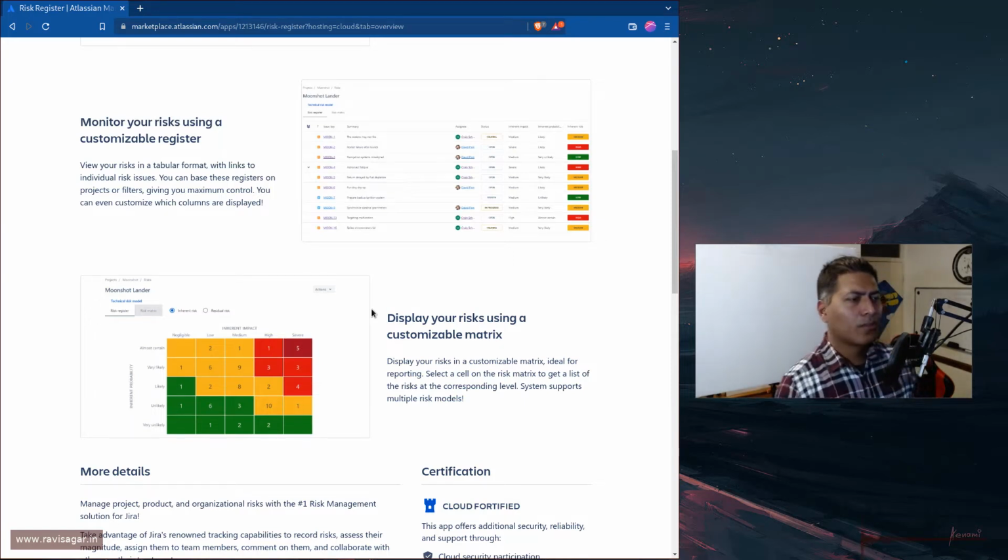So, to give you a simple example, let us say you have in Jira an issue type. You can call it any issue type. It could be, let us say, a requirement or a bug, or let us say you have a separate issue type called risk. Now, to get started, all you need to do, you need to basically have two drop-down fields. And I'm giving you a simple example where you can do risk management using a standard way of doing it. So let us say you have two fields. One field could be impact, right? And the other field could be, let us say, the probability.